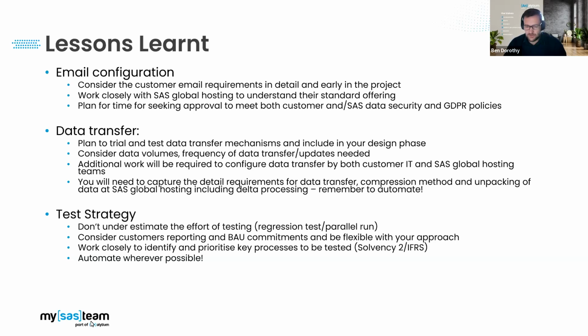So yes, we were aware of quite a large volume of data, but the other considerations were around where the data was being transferred from and to, the location of those data centers in the world, and where they were going to be backed up or replicated, and choosing the most optimal route of migrating that data and the best tools for doing it.